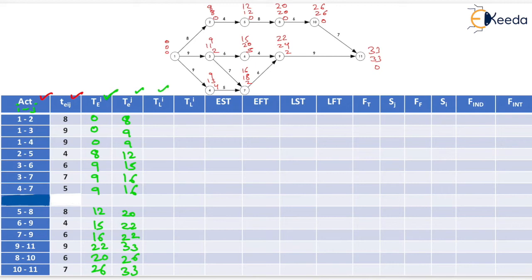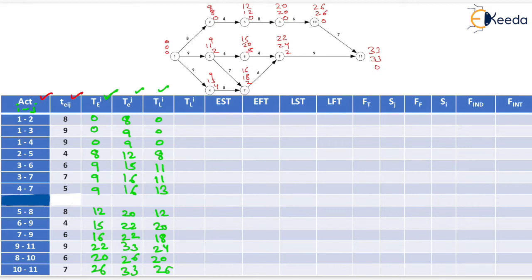Now we will fill the TLI column. TL for event 1 = 0 (three rows). For event 2, TLI = 8. For event 3, TLI = 11. For event 4, TLI = 13. For event 5, TLI = 12. For event 6, TLI = 20. For event 7, TLI = 18. For event 9, TLI = 24. For event 8, TLI = 20. For event 10, TLI = 26.